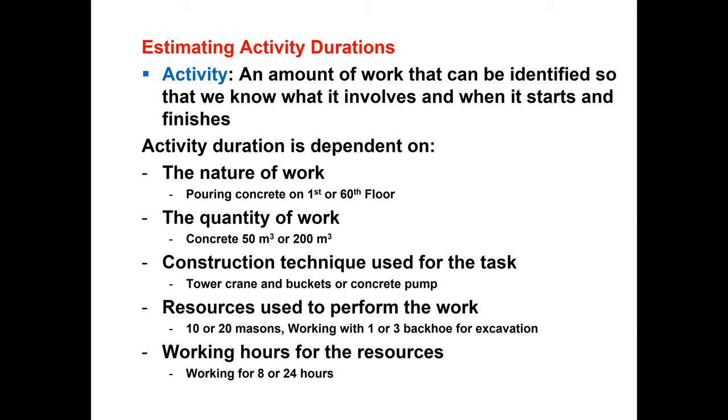Activity duration is dependent on the technique used to execute the task. Are we using a tower crane with buckets to pour the concrete, or are we going to use a concrete pump to lift concrete to the 60th floor? So what technique we use is also going to matter in the duration of the work. Also, the resources used to perform the work.